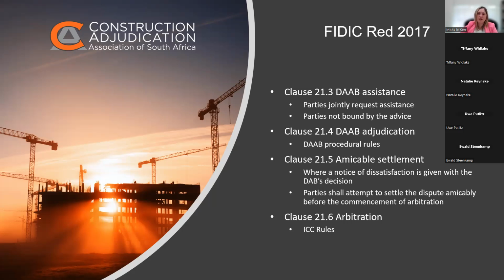This envisions that the DAAB is actually standing, so they're on site, they're aware of what's going on, they're reviewing the progress reports, they're attending the meetings and so on. And the parties can agree amongst themselves, we don't quite want to take this to dispute yet, let's ask the DAAB how they would deal with this. If we're not happy with it, it's not binding on us, then we'll make proper submissions, pull all our documents together, get our quantifications and so on, and submit it to them to see if we can change their mind on that advice. But let's get a quick high-level advice to see if we can avoid actually taking it to dispute. So that's the purpose of the DAAB.